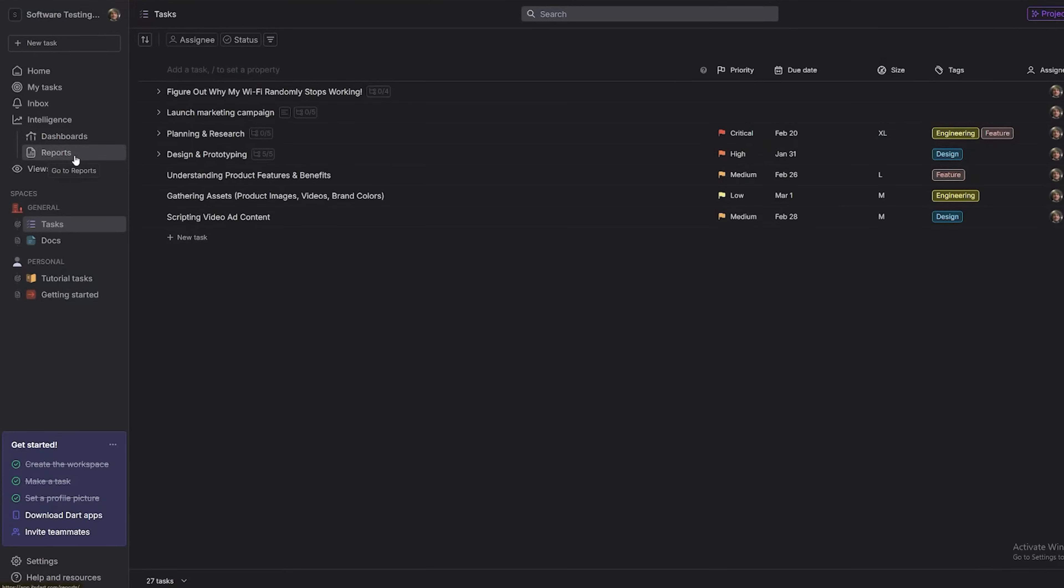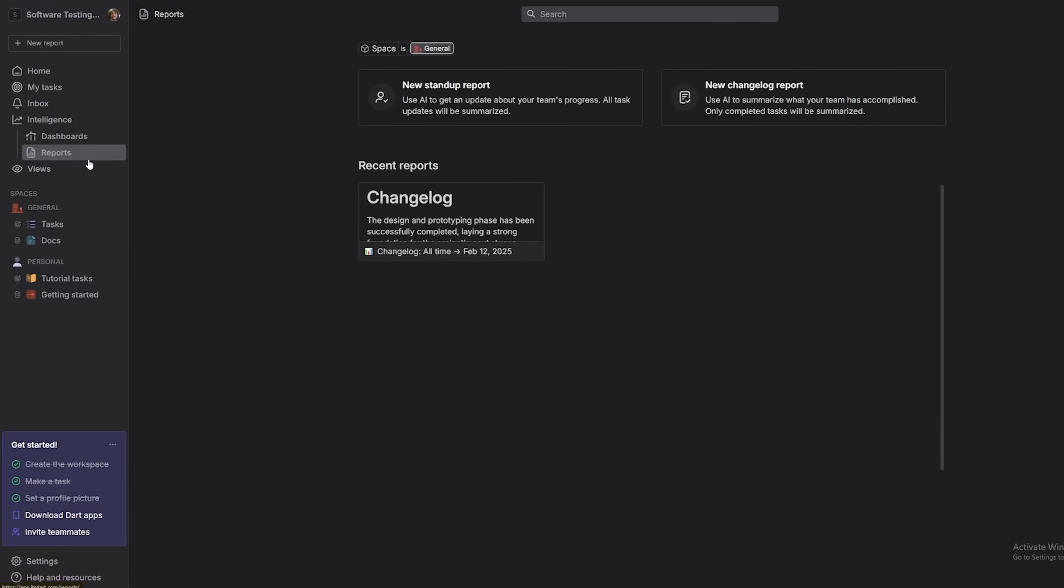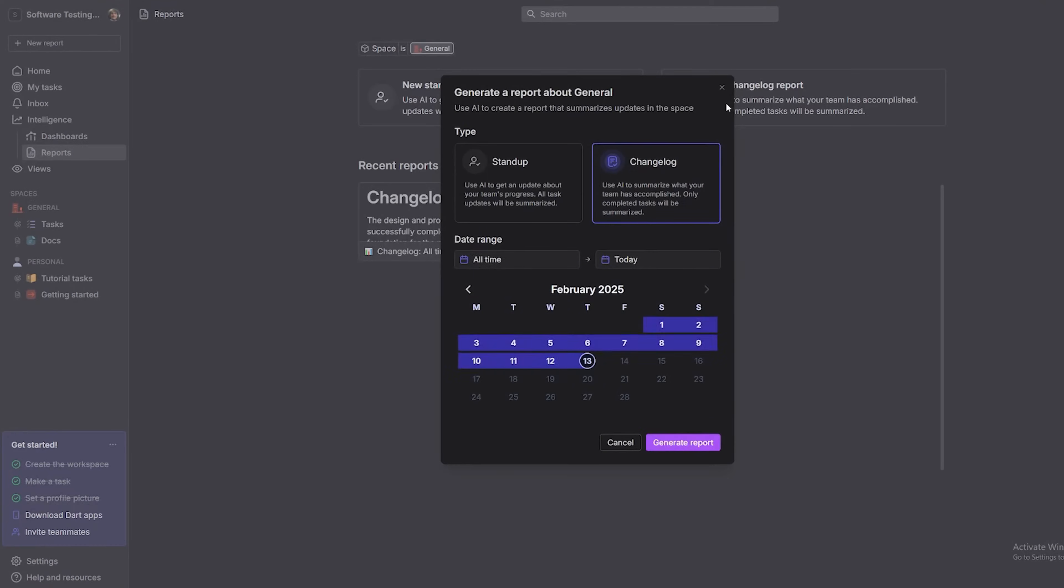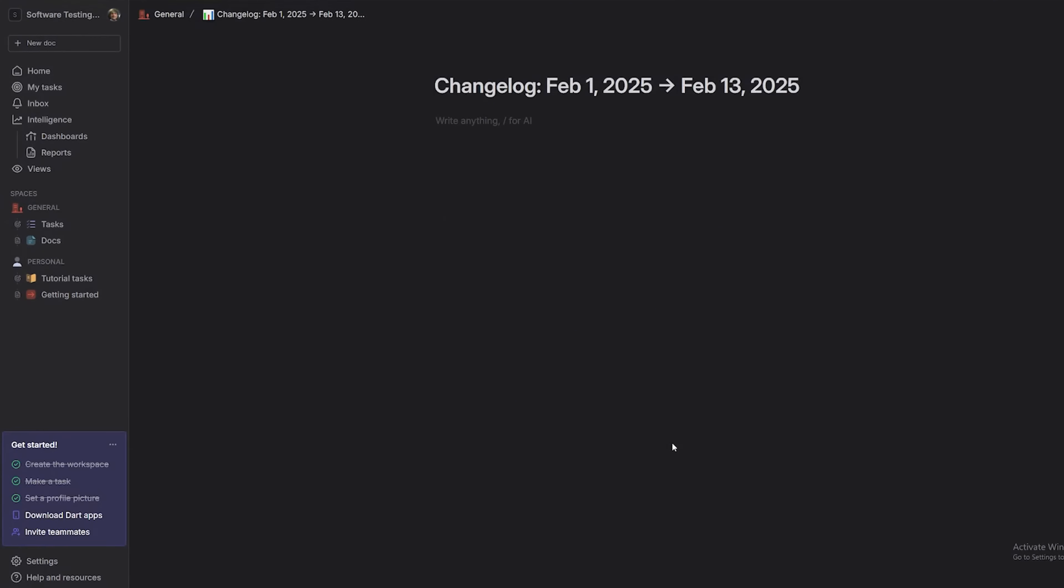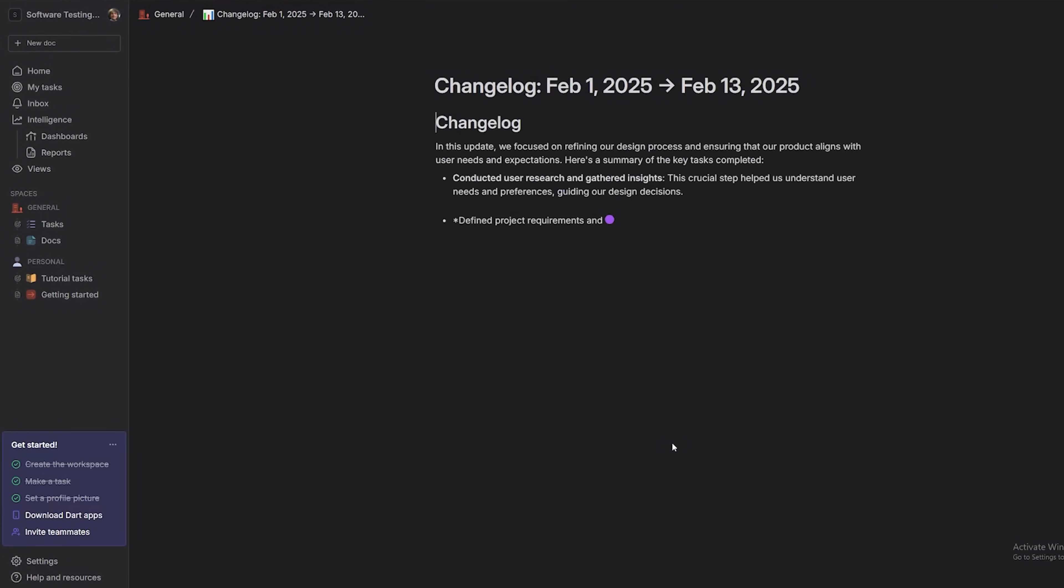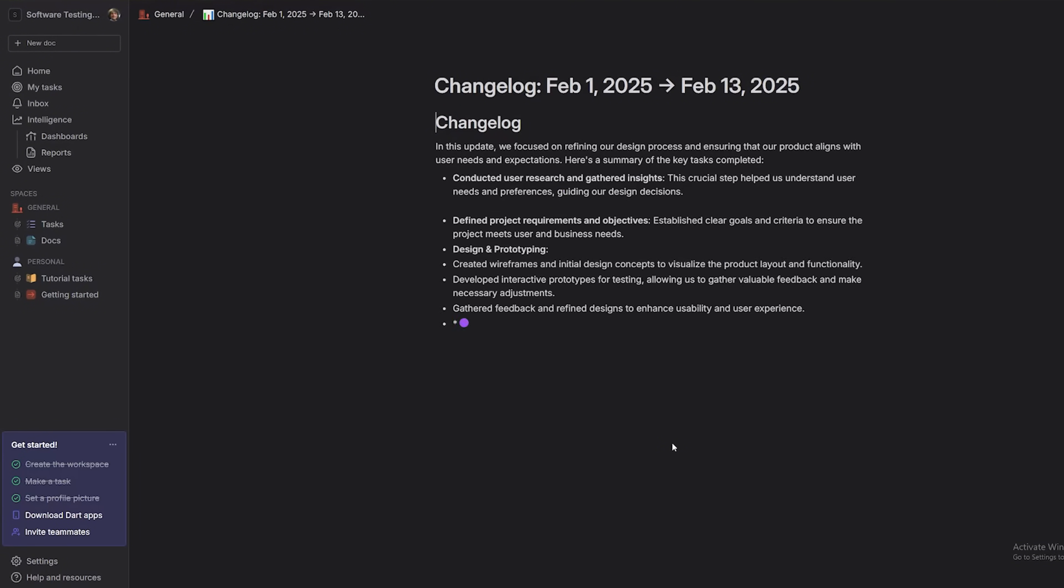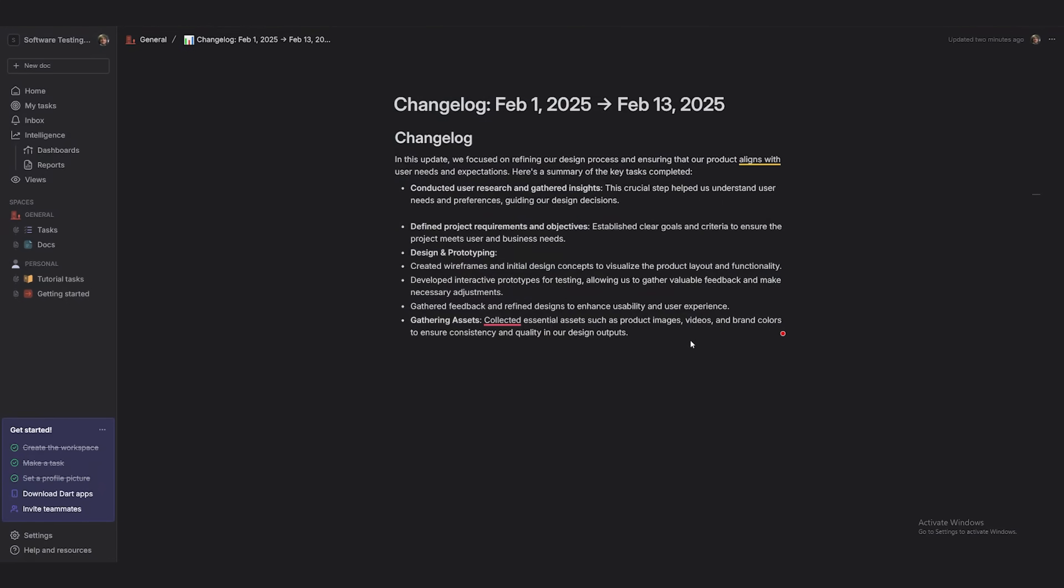Click Reports on the left side menu. Select your project. Customize the report by setting date ranges and choosing what data to include. Click Generate Report, and boom, Dart compiles everything instantly. Need to send it out? Export it in whatever format you need. PDF, Excel, you name it.